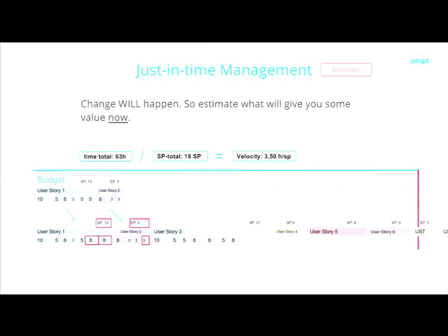And now, back to the headline, just-in-time management is so important here. And why that? Just-in-time management means that we should only look at what we need to work with right now. Because in the other model you saw, we tend to look at all our user stories, and then we broke all the user stories down to subtasks at the time where we have the least knowledge about this project. And that's a problem, because every time we found out that something changes, there might be some external APIs that didn't do as we expected, or anything like that, that we can expect to hit the rest of our user stories. If we already broke all these user stories down to subtasks, then we have a lot of user stories that we have to revisit. In this model, we only have to revisit what we already worked with, what we already broke down. So no, we don't have to spend that much time revisiting stuff.